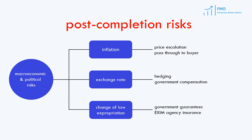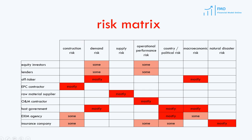We have outlined the major risks that a project faces and typical risk allocation in project finance. We can put everything together and analyze these risks using a risk matrix, which shows which party is taking the risk. A risk matrix is a convenient way to see that risk is allocated to the party most capable of managing it. On top of the matrix, you can see the type of risk — for example, construction risk or revenue risk — and on the left side of the matrix is the party to whom the risk has been allocated.